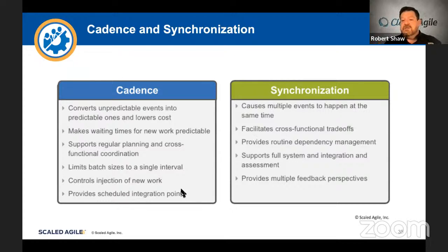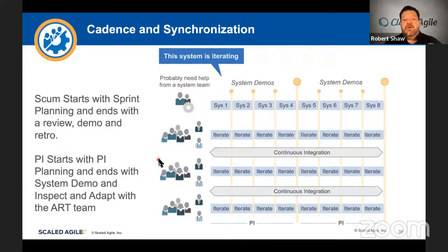Inside of that cadence, we have synchronization, where you have sprint planning, with the product owner of the team and potentially even subject matter expert stakeholders involved. Here's what we're planning. We have synchronization daily with the daily scrum, as the team gets together and figures out how do we serve the sprint goals today. You get to the end, and in that cadence, we have the demo: hey, stakeholders and customers, here's what we did. Let's get your feedback. What do we need to adjust next? So the concept is very similar when you start looking at how SAFe applies it within the ART.